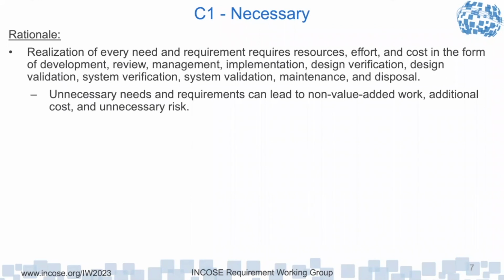In Australia, we contract for a fixed price at the system spec level. The US wouldn't do that, as we just pointed out. It would be done at the subsystem level, which allows the design space to mature. But it's an issue more for the way in which you use the requirement set rather than how to write it. But we could make some comment, I think, in each of the attributes or each of the rules.